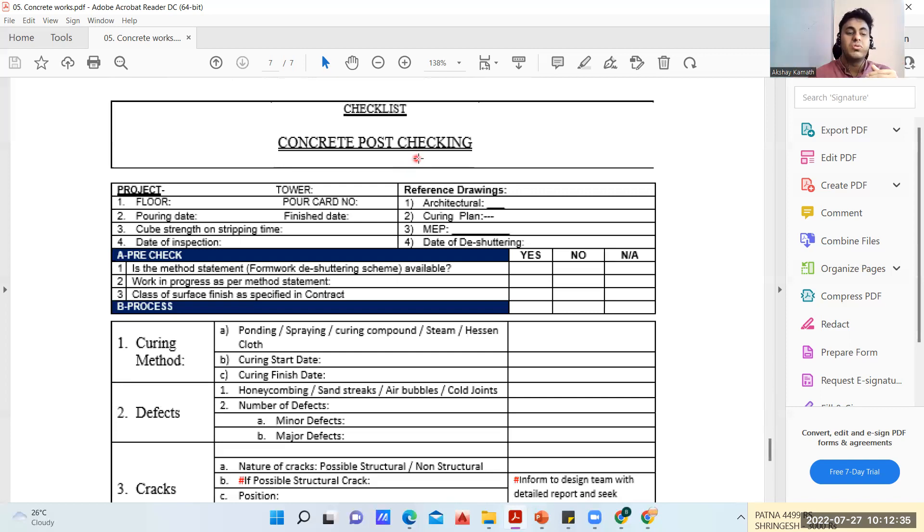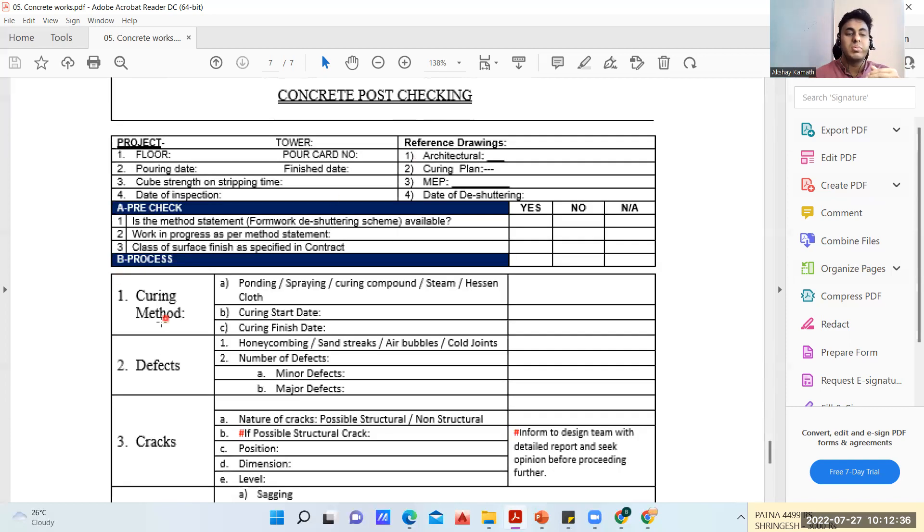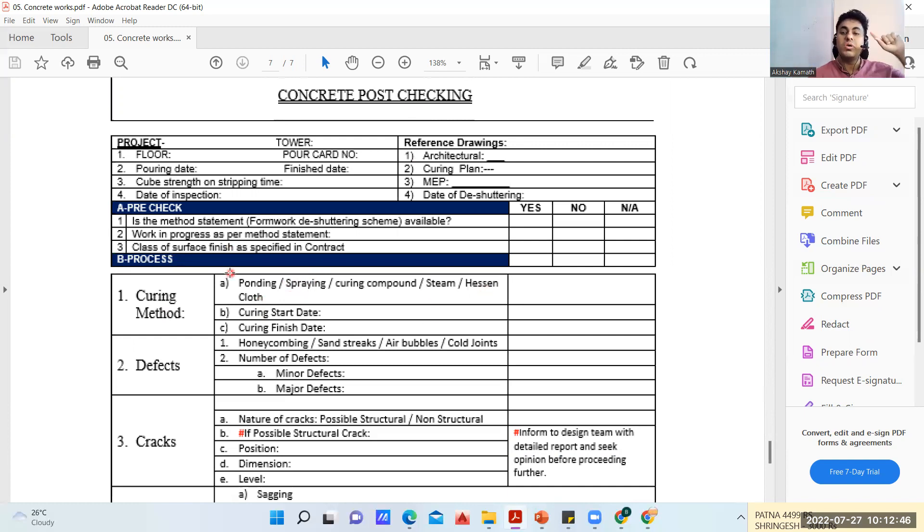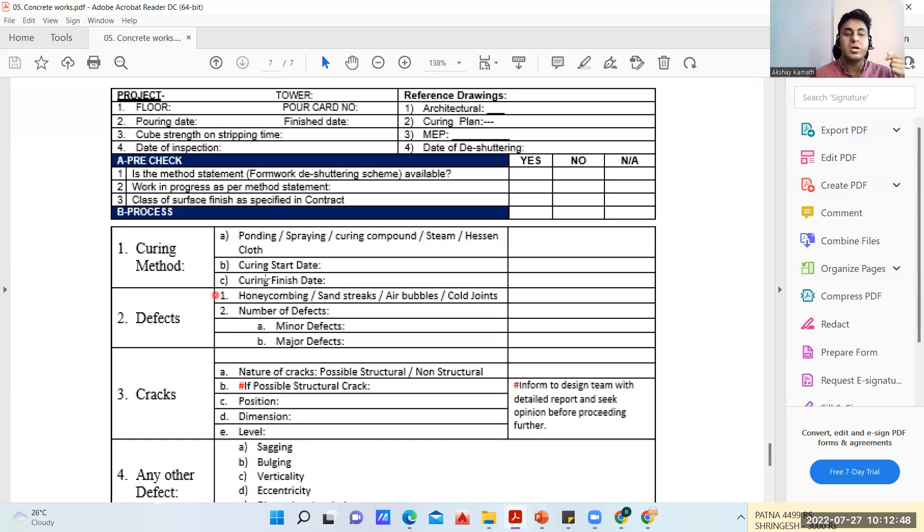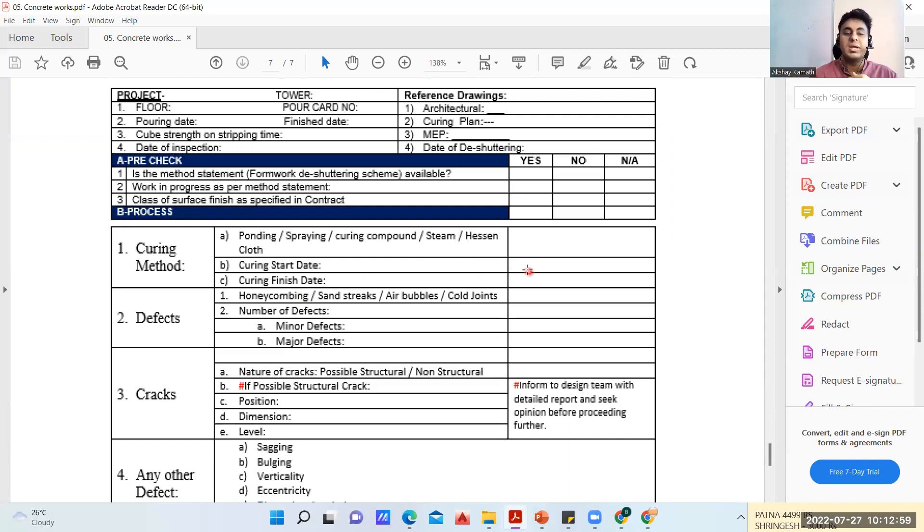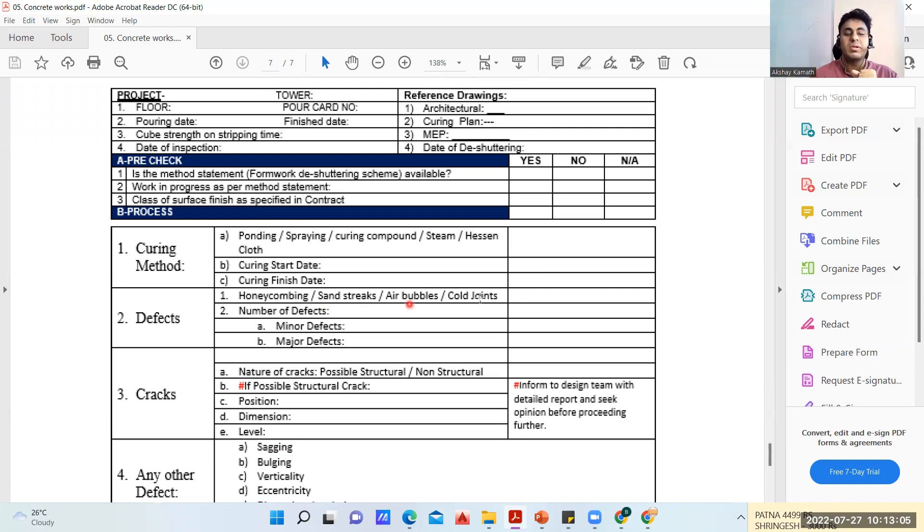It's written here: curing method - how we are going to do it. If it is for footing, we can go with the spraying method or with hessian cloth we spread. Ponding we usually do for the slab. Curing start date - today I casted the footing, so tomorrow I'll start the curing, so tomorrow's date I'm going to put. Curing finish day - usually seven to ten days. If tomorrow the date is 28th, seven days comes out to be August 5th, so that August 5th here.